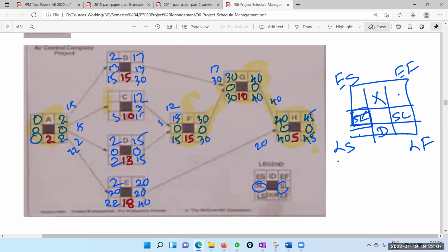Right. So anyway, you saw it. This is the critical path, and these are the critical activities: A, D, F, G, and H. Those are the critical activities. If you delay any of those tasks by at least one day, your deadline is not going to be met.